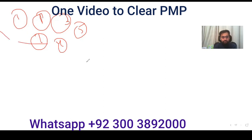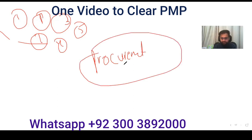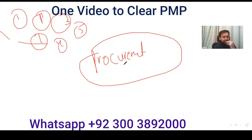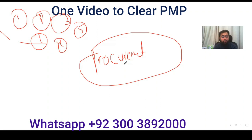Procurement is mostly done through predictive methods even in agile. In procurement: decide make-or-buy, identify potential sellers, make evaluation criteria and statement of work, advertise what you need, receive proposals, select the best seller, sign the agreement, conduct inspection and audit, and then close the procurement when complete. Finally, you are also checking quality standards and adhering to quality throughout the project.